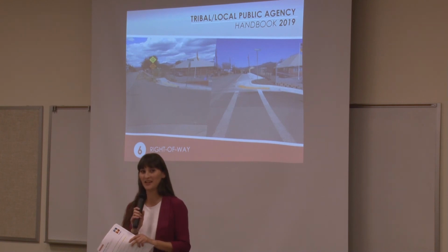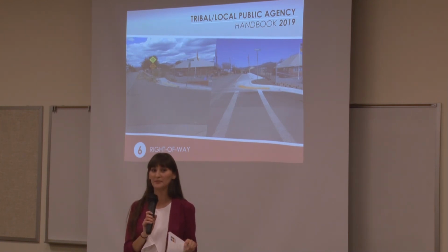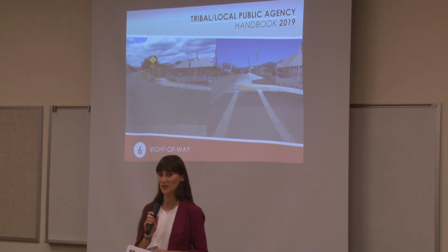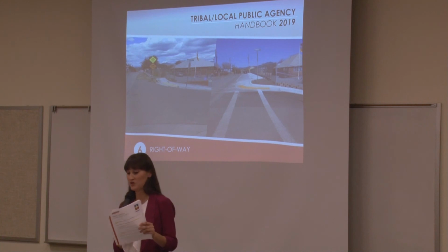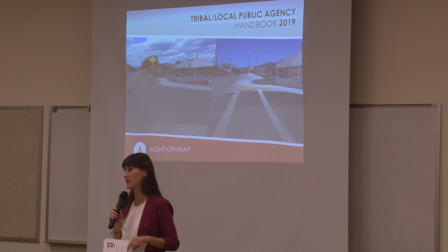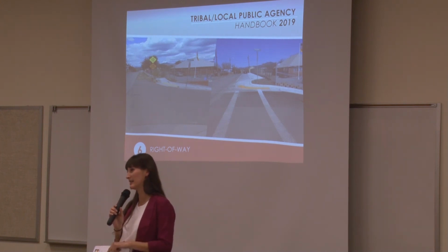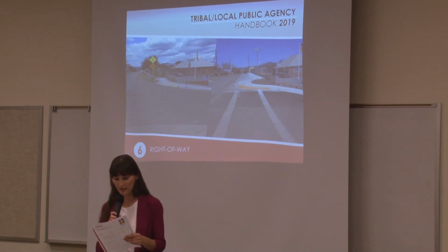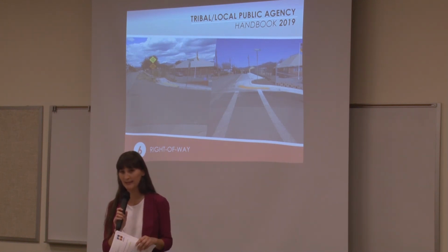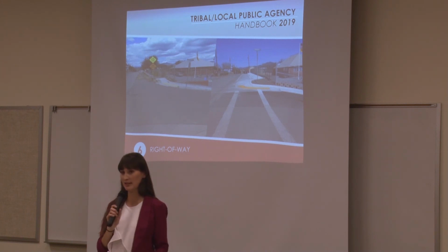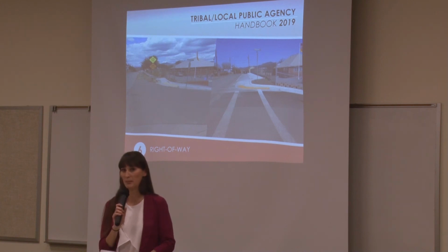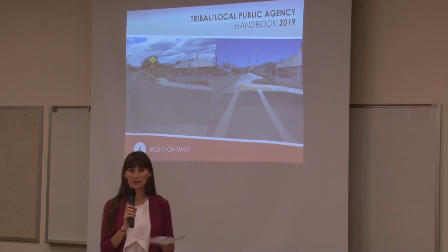Because that's below the cutoff, yep. For what? To be considered eligible for historic. Yep, so for historic structures, the cutoff is 50 years. So we kind of tried to trick you there. If it's 45, it's not technically historic. If it's 50, it might be with documentation. One thing to keep in mind is that not only buildings are historic, there are historic ditches and drainage structures and everything else that you can imagine can be historic. So keep that in mind.